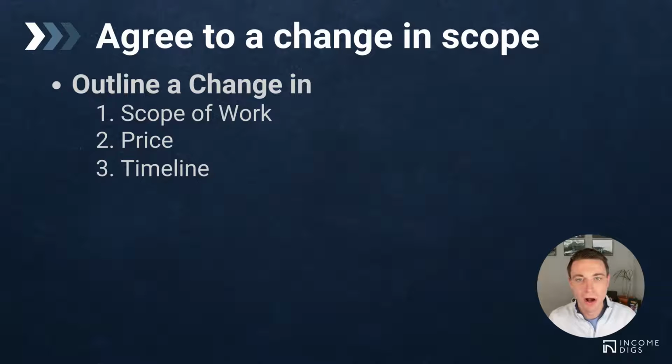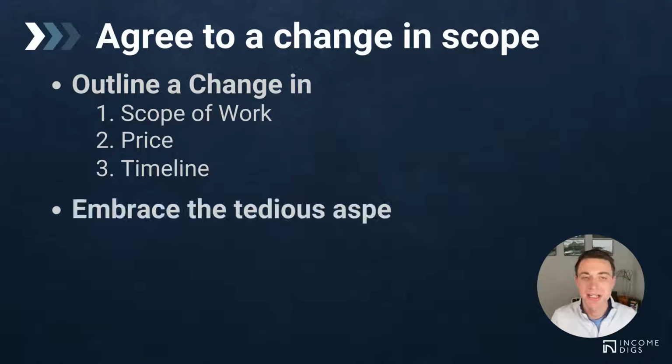What I mean by that is it's often a good idea to document a change order, even if the price doesn't change, just to indicate we're doing more or less work, to indicate that there's been an adjustment based on conditions of our conversations. All right? Embrace the tedious aspect of change orders.